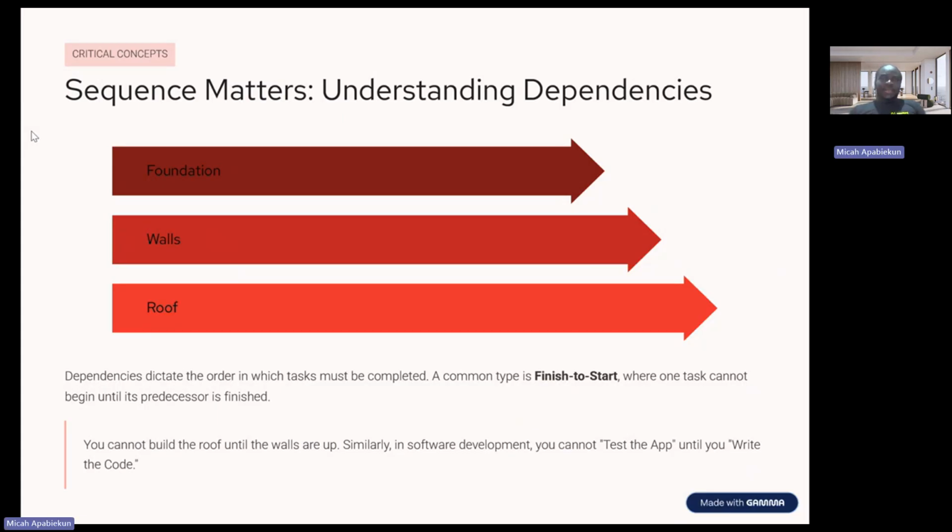So before you engage the developer, of course, you engage the developer. I'm working on this project, but the design is going to be done by this time. I want you to review it a week before it's completely done, so you can have an idea. And immediately he or she finishes designing, then you can pick it up to build your code. Do you see what I'm saying?